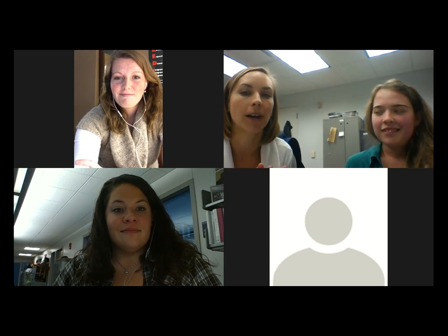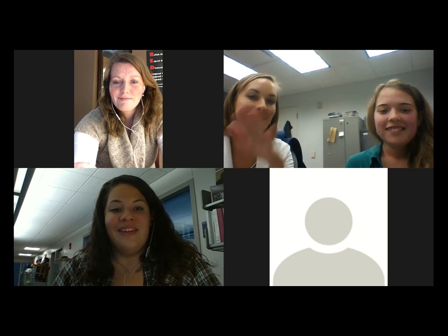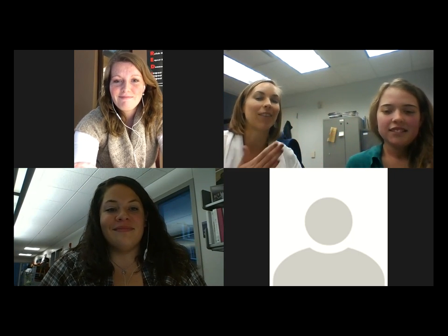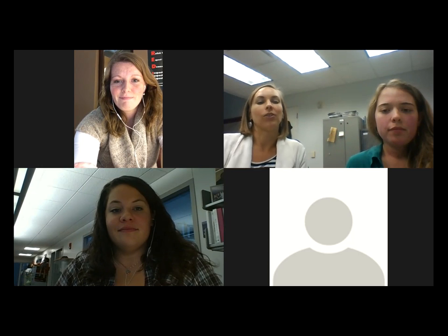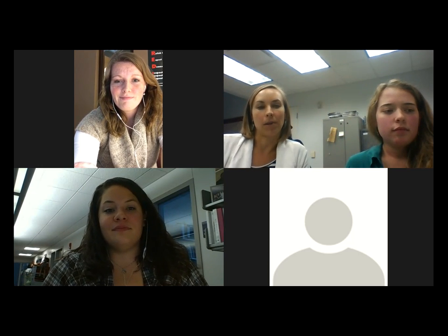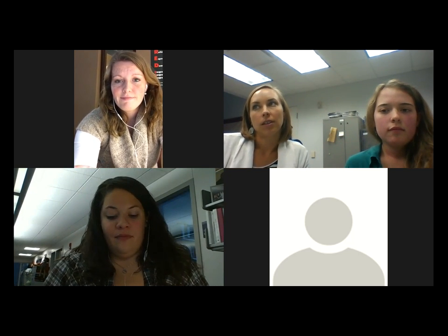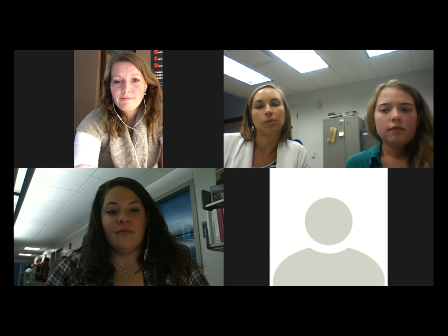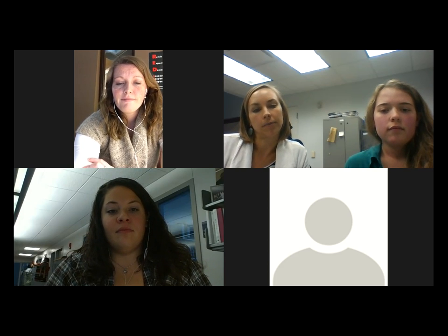And I'm always in my head going, okay, but if we want to have an event on that day, then we needed to have done this by this day, and this by this day, always backing it up and planning out from there, with people's schedules and that kind of thing. And maybe it's different for some kinds of events, but I think six weeks is when you should be ready to start promoting an event. You have all the details and you can start telling people when and where to be.